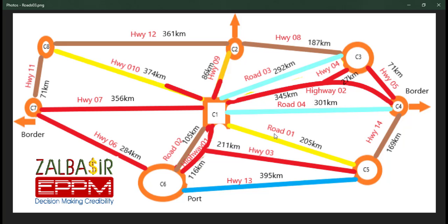So there is a lot of strategic thinking behind the decisions, and in this scenario it allows us to build, for example, Highway 2 and Highway 4 to replace Route 3 and Route 4. By putting in Highway 2 and 4, we are replacing and upgrading Route 3 and Route 4 as a strategic decision that will minimize cost. We have one highway to connect these 3 cities, with a small link, rather than developing and upgrading these big, lengthy roads, which would also cause trouble by slowing the economy during the development.